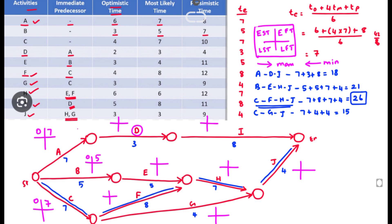Adding durations forward: 0 + 7 = 7 for A; 0 + 5 = 5 for B; 0 + 7 = 7 for C. The EST of the current activity equals the EFT of its predecessor. So for D, EST = 7 and EFT = 7 + 3 = 10. For I, EST = 10 and EFT = 18. For E, EFT = 5 + 5 = 10. For F, EST = 7 and EFT = 7 + 8 = 15.